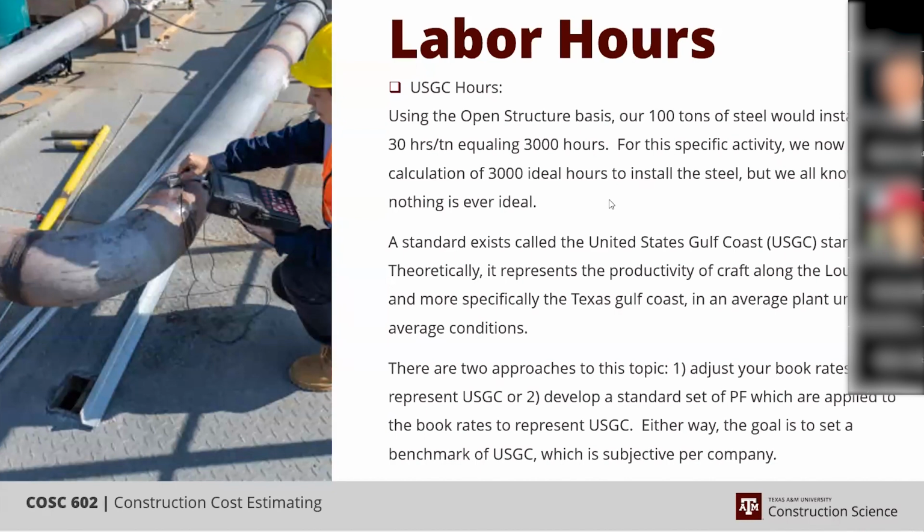But again, at this point, if you're just sitting on top of your book rates, and hopefully you know whether or not it's been modernized or not. If it hasn't been modernized, you need that 3,240 hours multiplied by a modernization factor to get it up to today's practices.